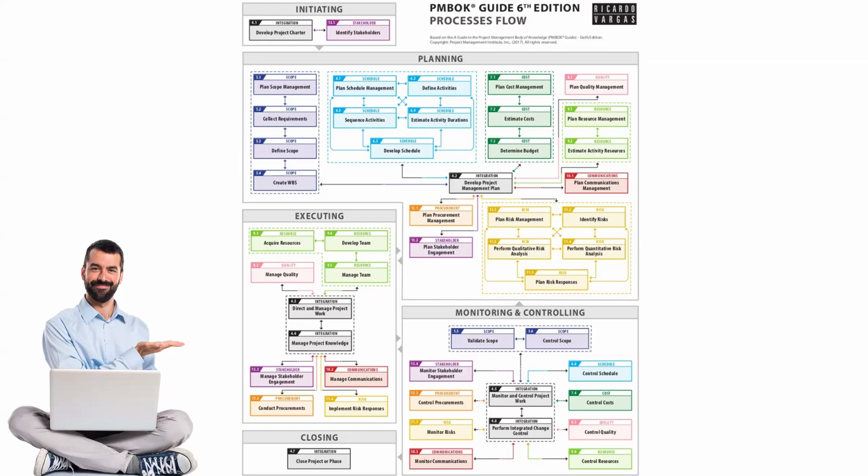So validate scope is the process which receives the verified deliverable and checks it on a checklist given by the customer, that these are the elements which must be present in the product so we can accept it. So validation happens there, and when a product has been validated, it is declared as an accepted deliverable. So the journey of the deliverable here only relates first with quality control, which verifies, and then with validate scope, which validates and accepts the deliverable. Rest, all the 10 processes are only dealing with the work. So this is the story of monitoring and control.